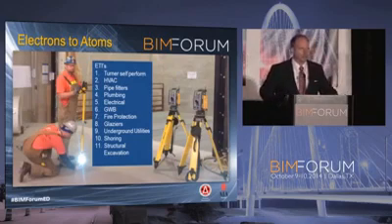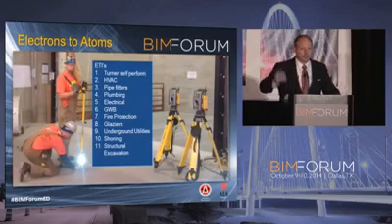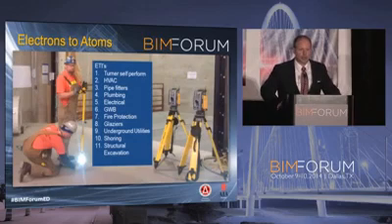How many times have you done a great MEP coordination model, and they go out to build it, and then the ceiling grid starts to go in, and somebody says it's too low. And everybody goes, what happened? Well, they all measured off the floor. And then the client says, well, why did we model it? I spent all this money on modeling, and now it's wrong.